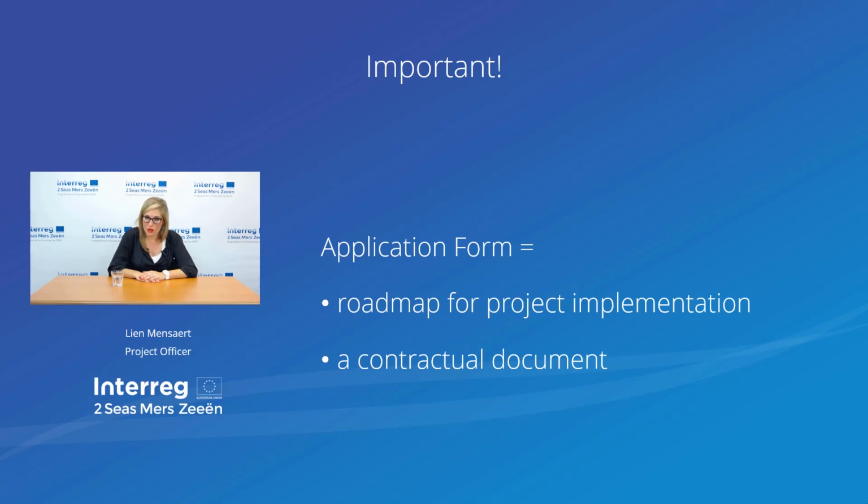And it is also a contractual document, so if there are any changes that need to be made to this document, this will mean that we will have to start up a modification, which can be a simple modification or can go to a technical or a major modification. But in any case, it has a risk to delay your project. So if there is anything that you can clarify from the start, then please take the time to do so before the submission of your application form.